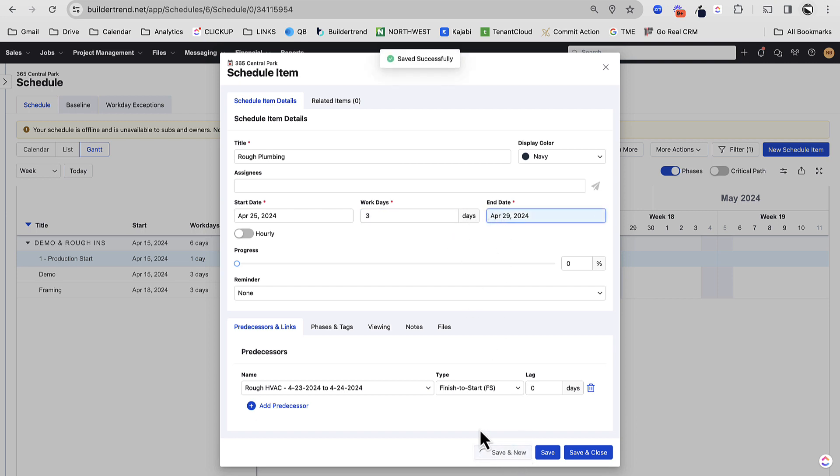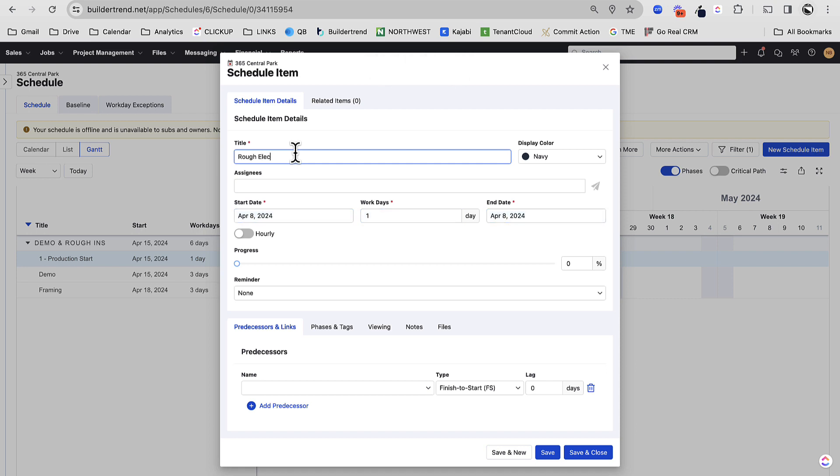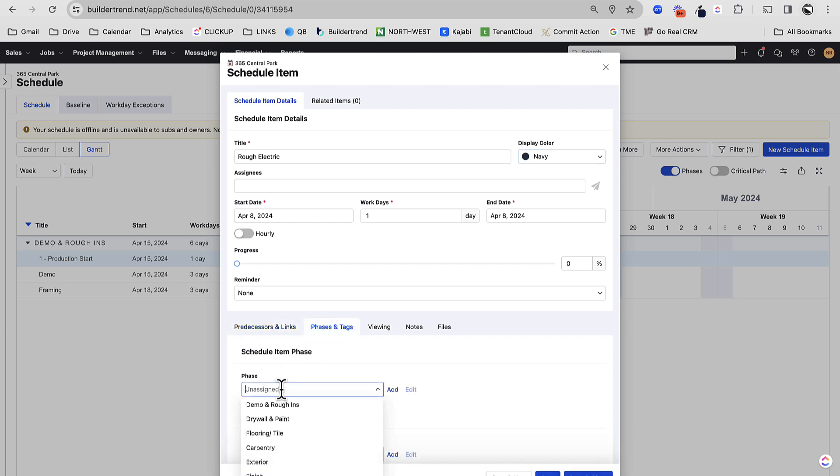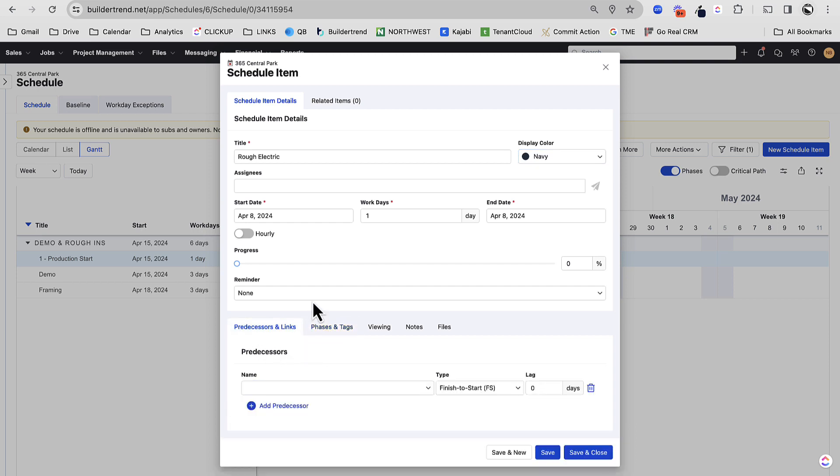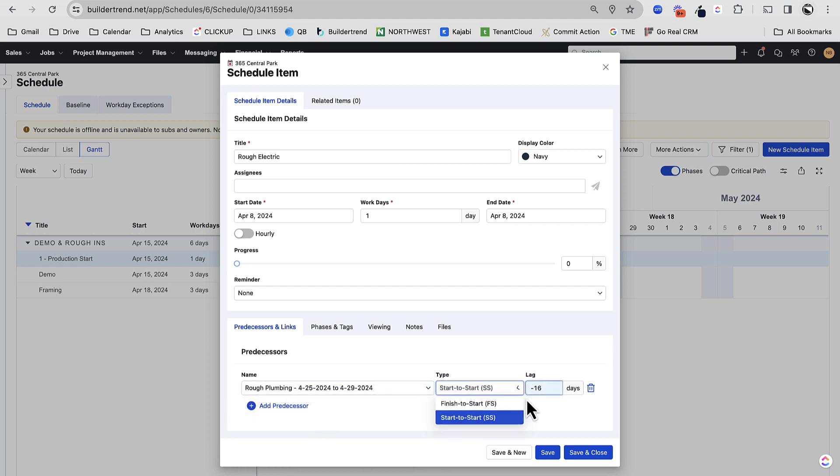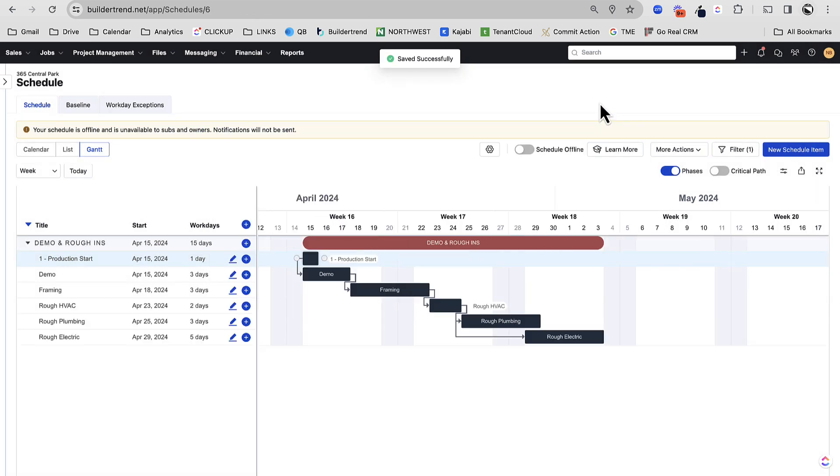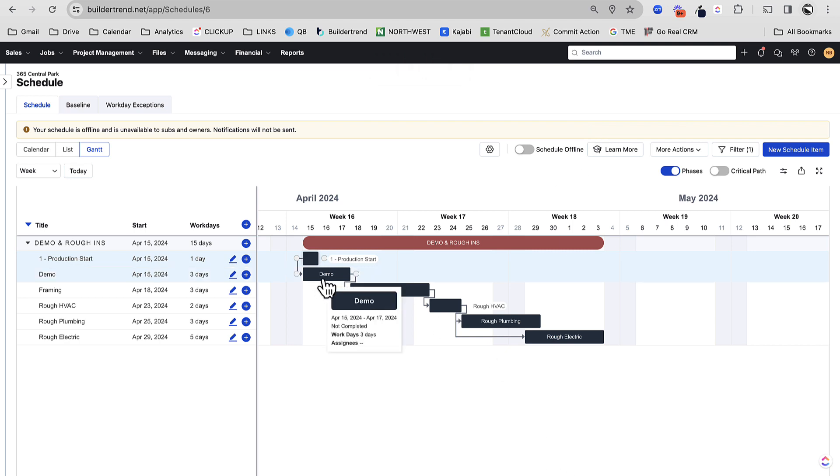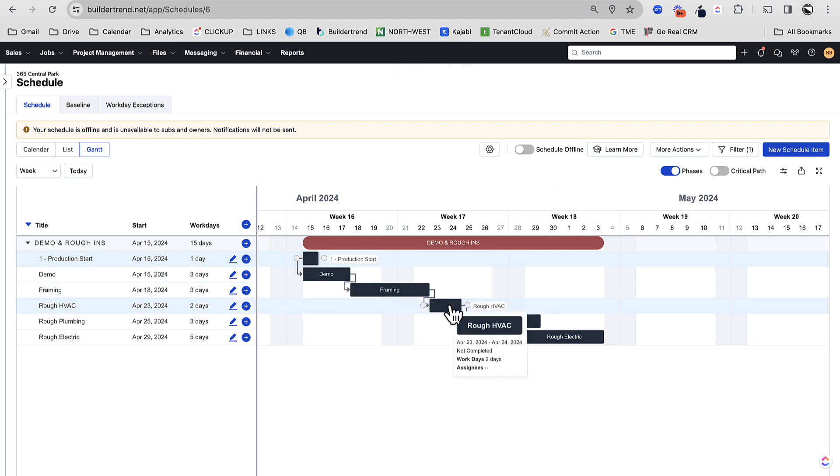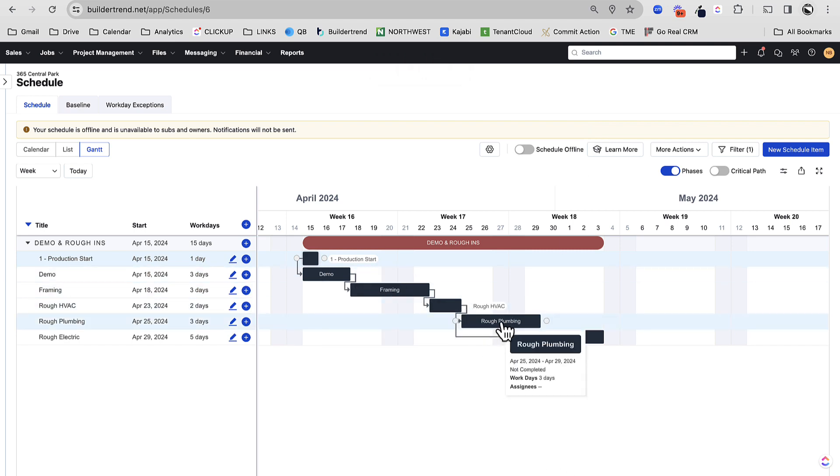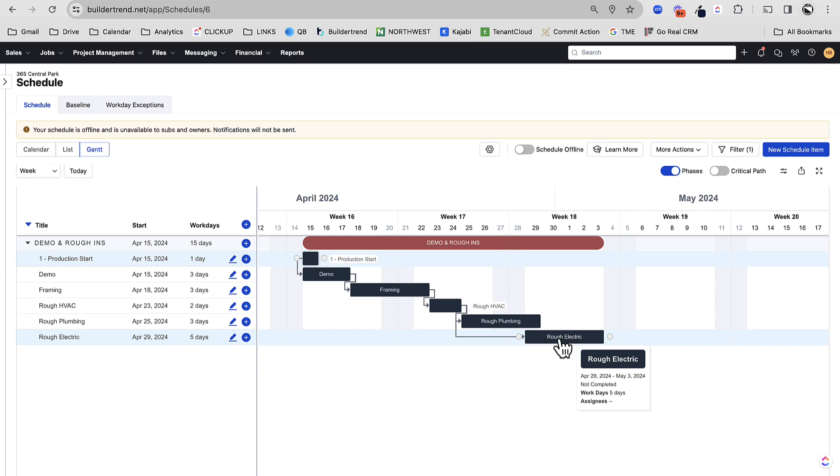Let's do one more. And here, I'm going to do rough electric. And here, let's use a start to start. So let's say that I don't want my electrician and my plumber walking on top of each other. But generally speaking, as long as the plumber's started and he's had a couple days to work, we can maybe do a start to start plus two. And let's see what our schedule looks like now. So there we have demo to framing to rough HVAC to rough plumbing. And then here's my start to start.